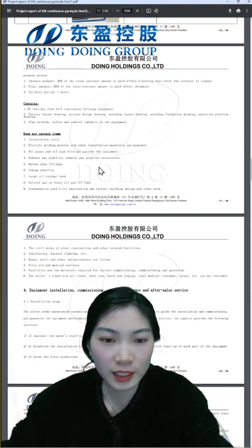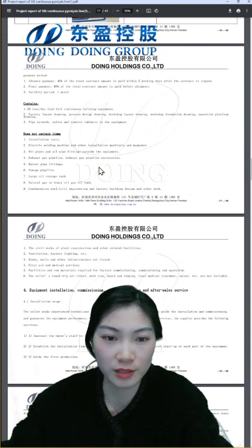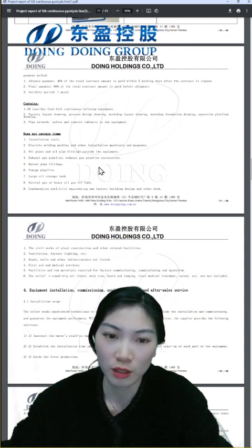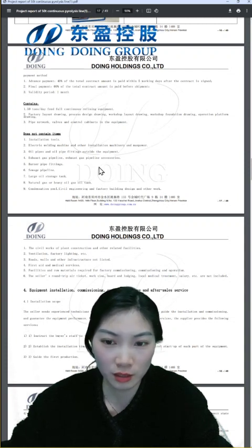For a fully continuous pyrolysis plant, normally you need to solidify your land. You can prepare one line 10 meters wide by 70 meters in length. Then after that, we will also give you some points to help you make sure of the installation points.